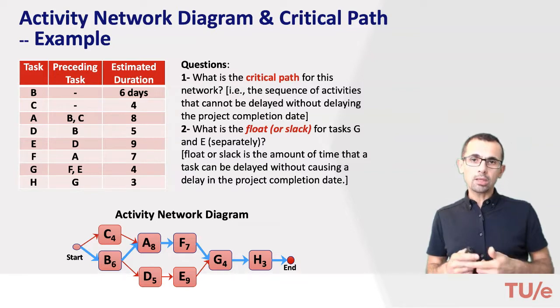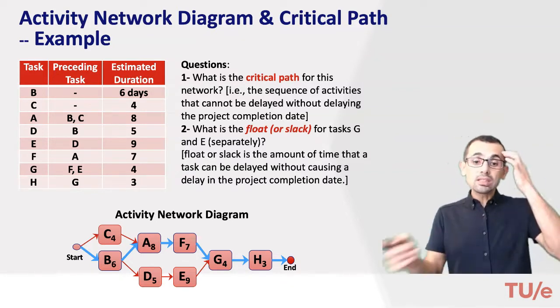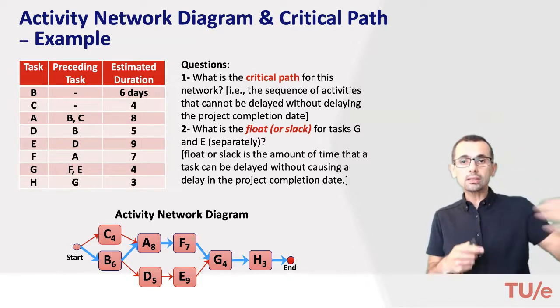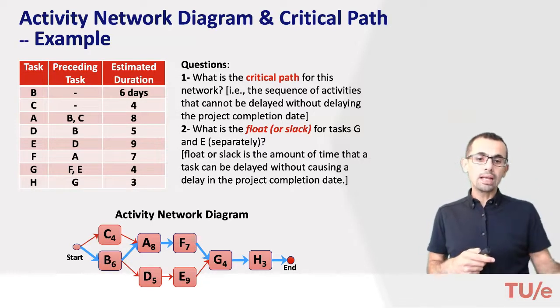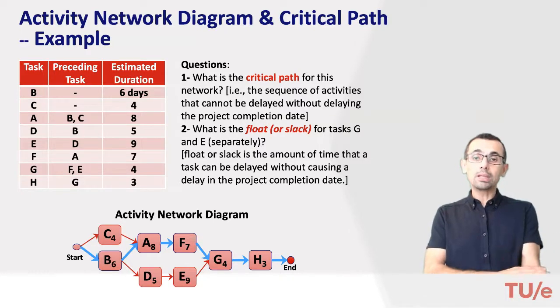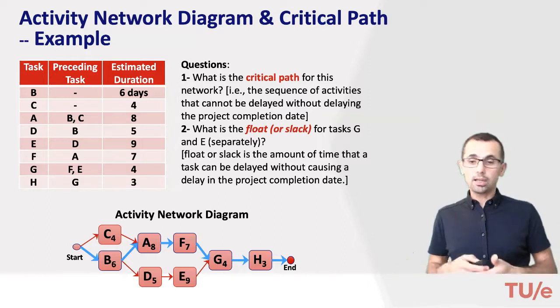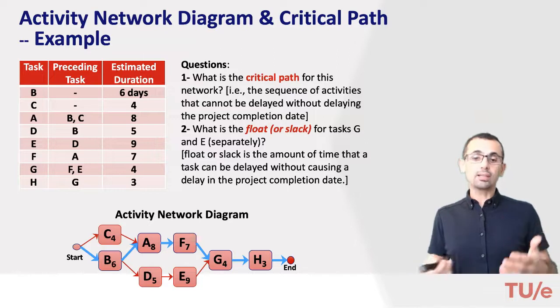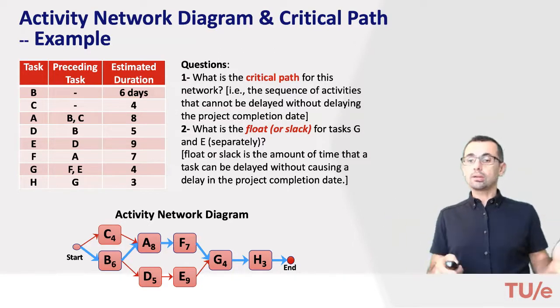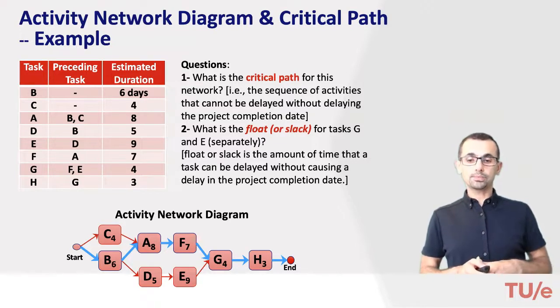Slack of one day basically means we can start the activity 1 day later than the originally planned date, or we can be a bit lazy. In fact, we can prolong this duration for another day and we would still be fine, because it will not influence the entire project duration. That's what we are concerned with in the slack discussion. Okay.